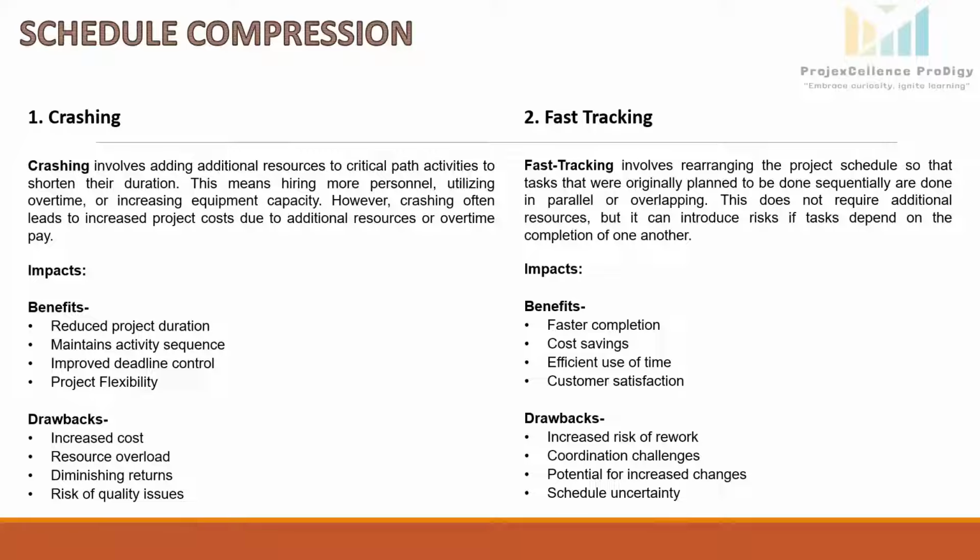But in this case, MEP installation for completed floors is started while construction on the upper floors continues, which will allow multiple teams to work simultaneously. The landscaping and the exterior work are usually planned towards the end of the project, so it may begin while the building is still being completed.